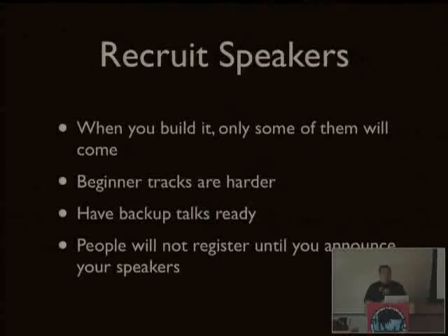Just because people say, yes, I will come to your event and give a talk, does not mean that they actually will. You're going to have everything from somebody contacting you 3 weeks before to say, oh, it turns out I have to move, I just got a new job, I can't come to your event, to the, hey, I know my talk's in 4 hours from now, but it turns out that my airplane's stuck in the snow and I can't make it. And you need to be prepared with backup talks.